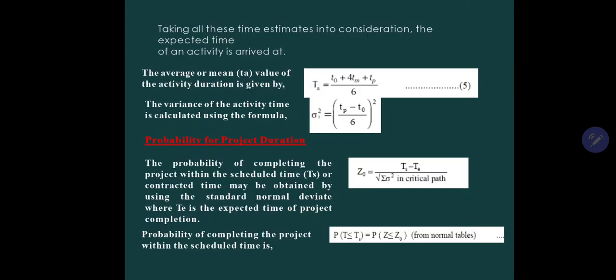Taking all these time estimates into consideration, the expected time of an activity can be calculated by this formula: T0 plus 4TM plus TP divided by 6 will give the time estimate, that is the average or mean value of activity duration.